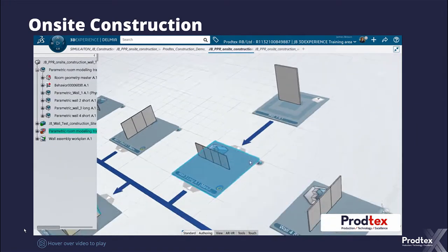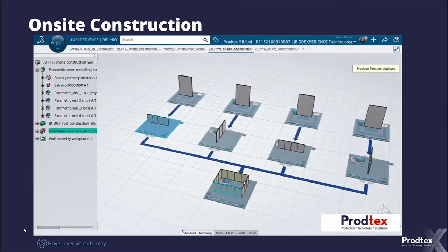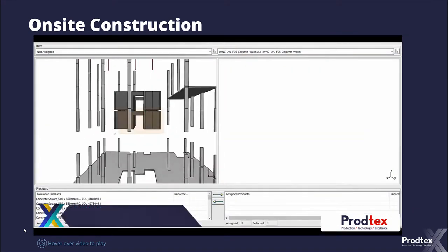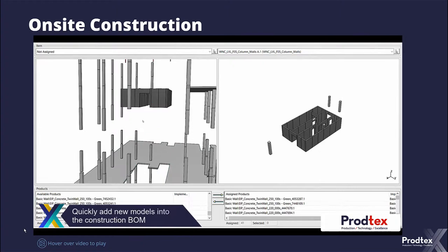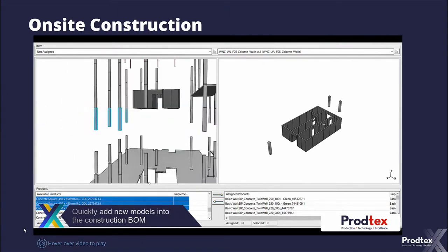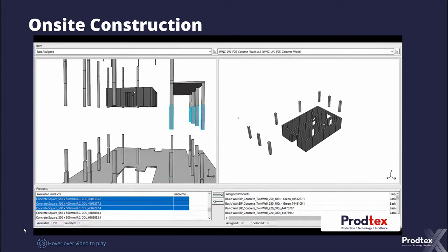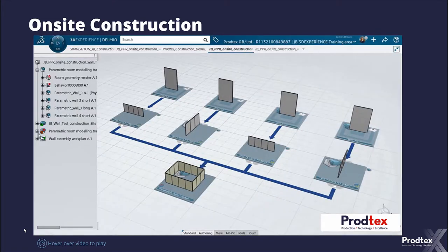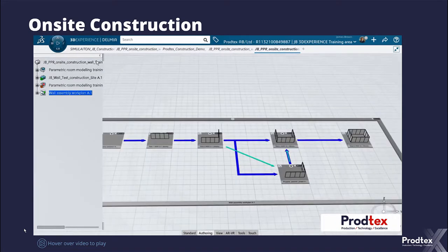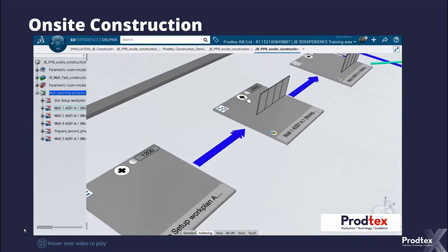The Revit model might have been structured by the architects in a very specific way, which makes sense to them, but doesn't really make sense to me as a planner, because actually I want to do this floor by floor, which isn't how they've structured their data. So here you can see I'm very visually just taking the CAD and creating this process where I'm splitting it out however I need it, to make it a little bit easier for me as a planner.